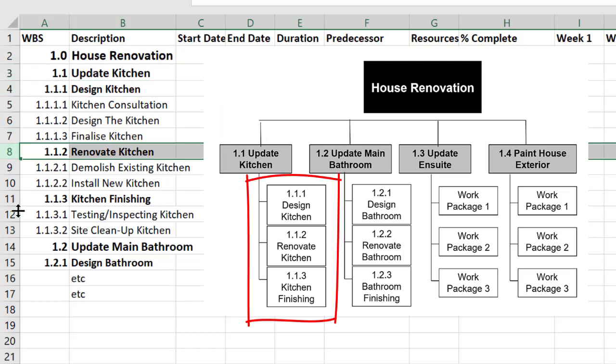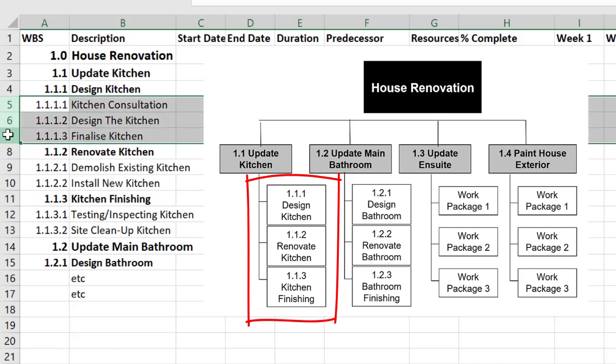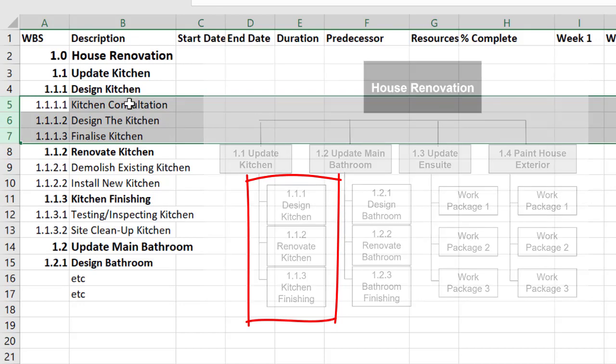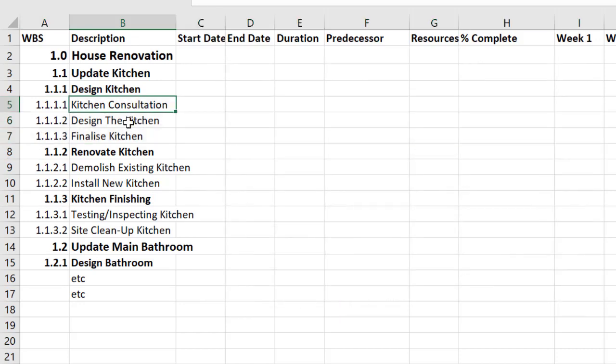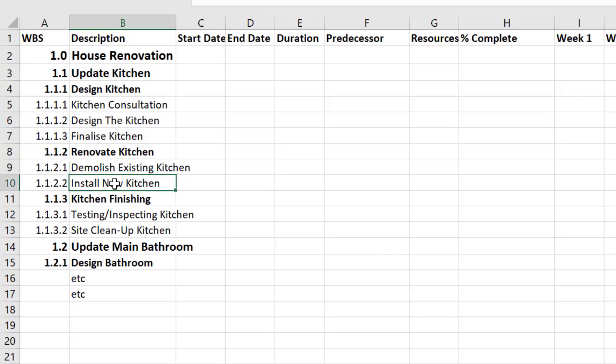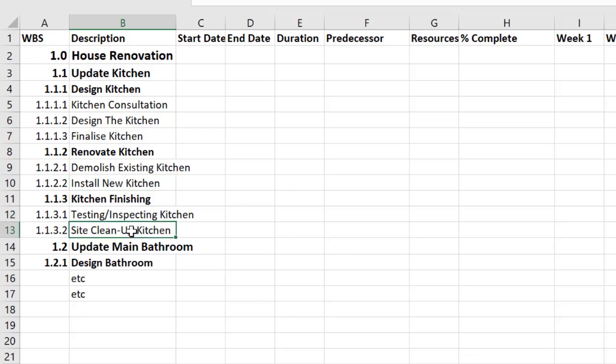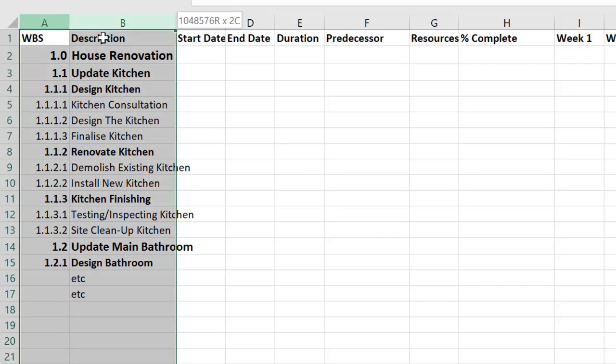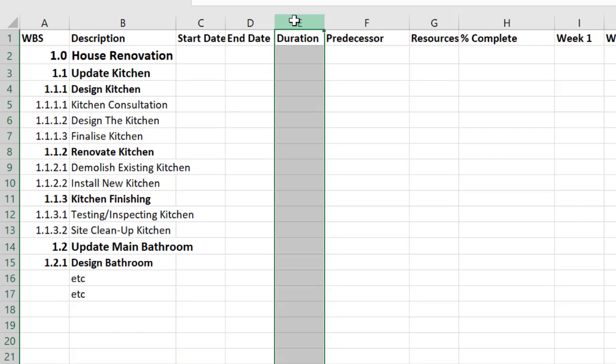So following the updating of the kitchen there's a few work packages here. Design, renovate and then do the finishing tasks and in my Gantt chart I've broken these down a little bit further to show that to design a kitchen I'll do some consultation, I'll actually do the proper design or blueprint or layouts and then I'll do finalization activities, sign contracts or whatever needs to be done. For renovating I'll demolish the existing kitchen and remove everything and then that will be ready so that I can install the new kitchen and there might be some tasks in there like organizing contractors, purchasing the appliances, all those sort of subtasks that might go with installing. After all the install's done then I'm going to test and inspect everything and clean the site up afterwards to make sure everything's spick and span. So the first step I've done here is to complete all of column A and B and then I can go to duration, column E.